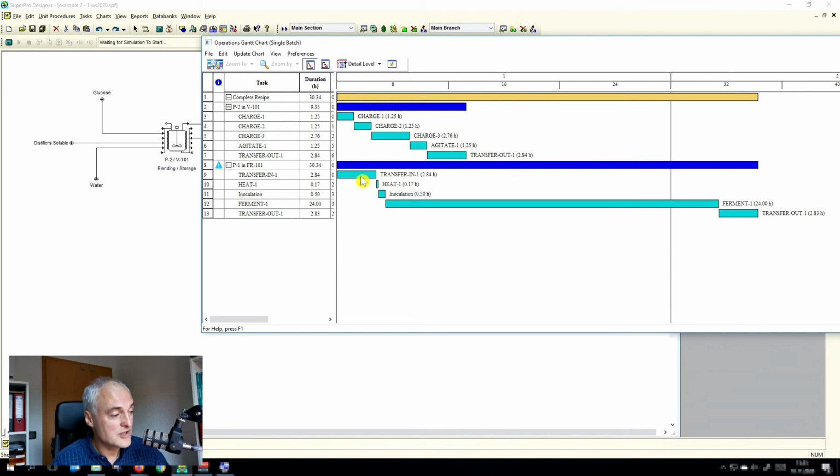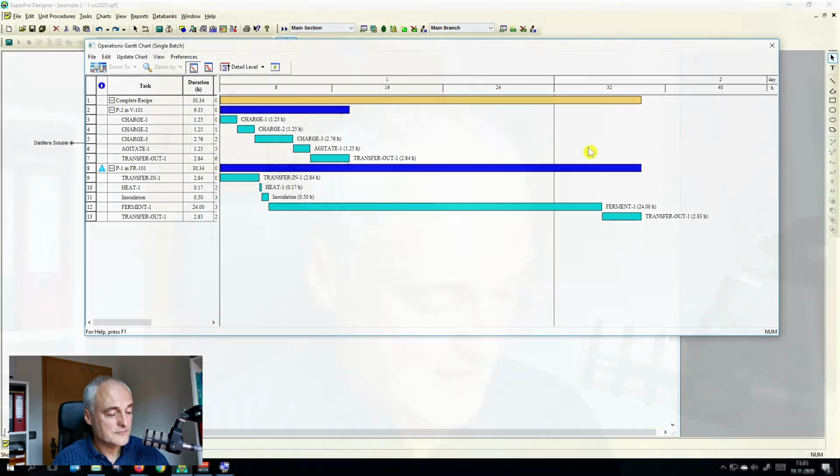So this transfer in operation, of course, should start at the same time as this transfer out operation here starts. And then it should also take the same amount of time as this transfer out operation. Only then it makes sense. So therefore, the complete process here should start there. And of course, there is a way to tell the software to do that. So we're at point 2.2.3, schedule operations. So what we need to do now is tell the operations when to start.